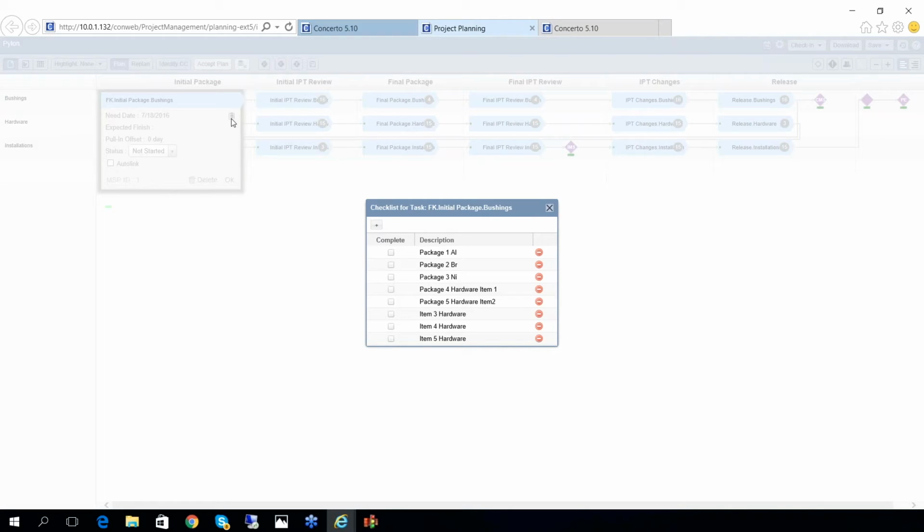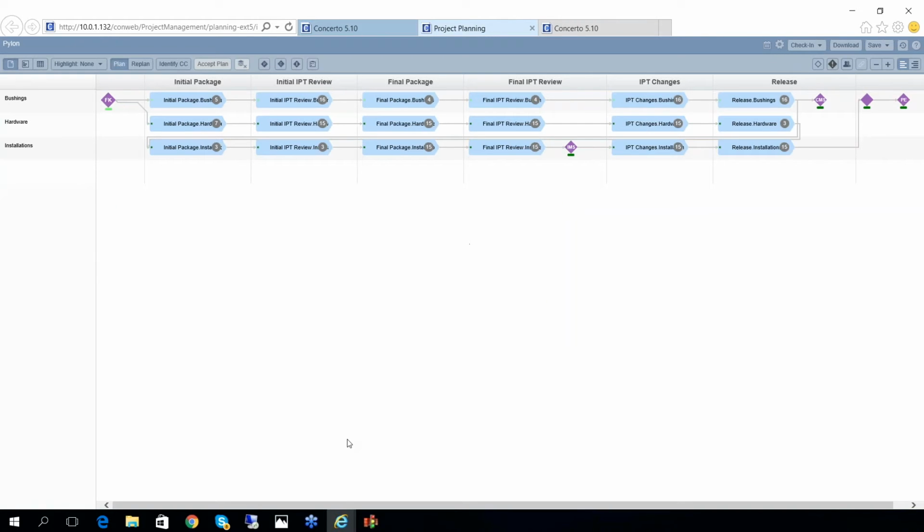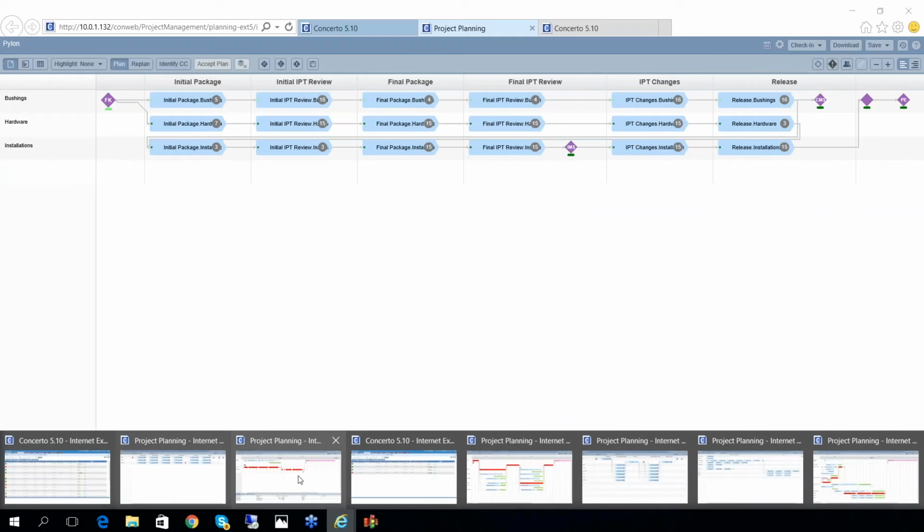And so in planning, your effort should be to get all these inputs on the front end of the project. In reality, some inputs will be late, so they might arrive when you actually execute the project. But from a planning and representation perspective, you need to just manage these inputs coming into one single point.